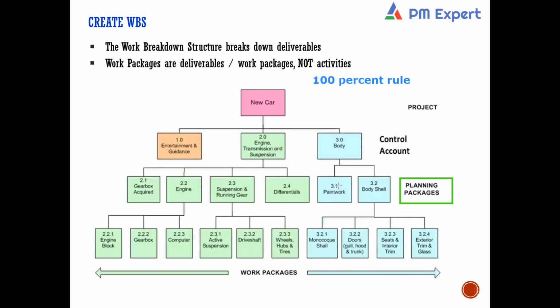There can be some components about which you know that they have to be there in the overall scope, but you don't have clarity about those. Can there be some components in the work breakdown structure about which some more clarity is required? Yes, definitely. There can be, right? And that means the dictionary for this component will be refined as you move forward, as you get more clarity. Yes. Right? Such components are called planning packages. Is that okay?